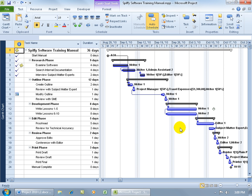The difference between splitting a task and what we're about to do here, which is called rescheduling a task, is rescheduling a task is taking a task that has already started, even if it's only 1% complete, and rescheduling that part that hasn't been completed yet to a specified later date.